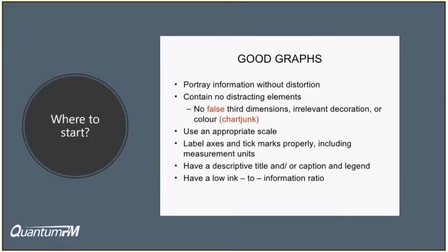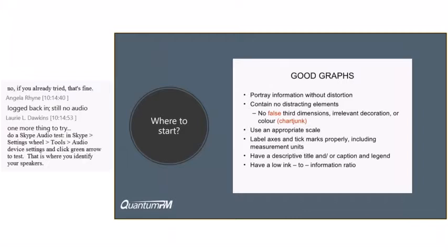So they manipulated the chart so that it showed a big gap between the others simply by changing the parameters on the graph. Didn't change the data underlying it, but it did make it look like one project was doing much better than the others. When that was discovered, which it obviously would be, it was pretty embarrassing for that group. So not a good way to go about it.